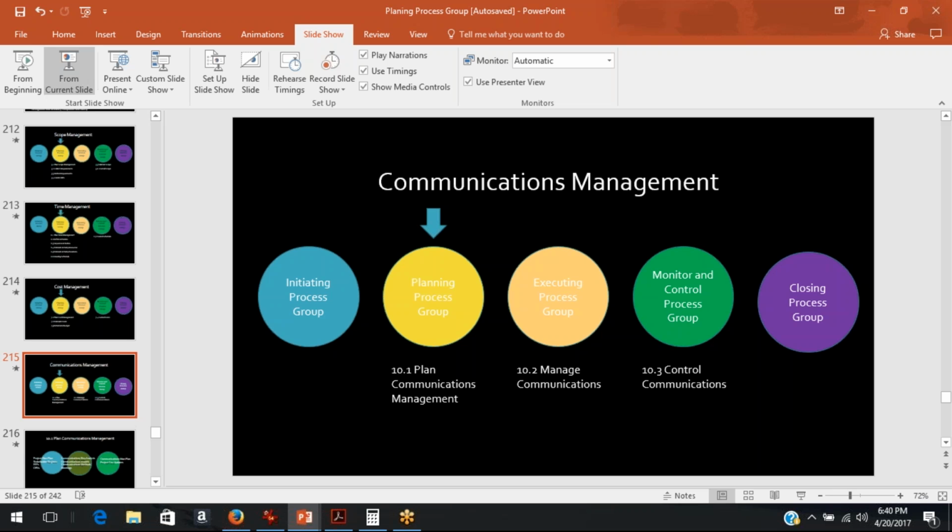So not just informing your communications, but when I say communications management, this also is your work authorizations. These are where I'm assigning people. So it's the nuts and bolts communication as well. It's the reports back from the field so I can do earned value calculations, and they have to be timed so that I can do those. All of this is controlled here in my communications management.